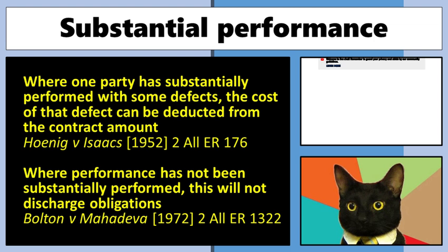All right. And there the court said that, look, we're not going to be the destroyer of bargains. This contract was for this much, and you reckon that you finished it, they reckon you haven't. These guys have managed to prove to the court that there were some defects, and they've paid someone to do it. We're going to deduct that amount from the contract price. It's really logical when these things come up.